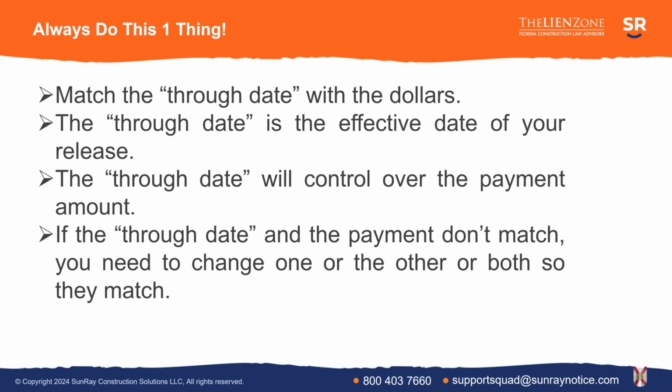So if you are giving people money and getting releases, you would like those releases to always be $10, so we don't even have to argue about whether or not they got enough money to satisfy the condition of the release. The converse is also true. If you are giving people releases and picking up checks, you want to make sure that the release has the amount of money that you are expecting. So if you're expecting a $10,000 check, you want that release to say in exchange for $10,000, not $10,